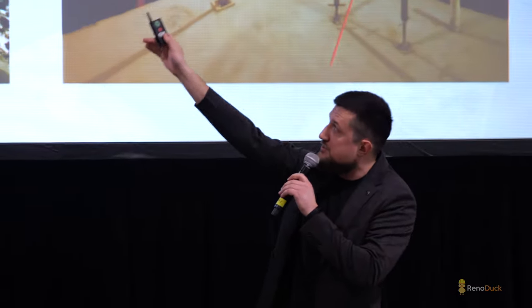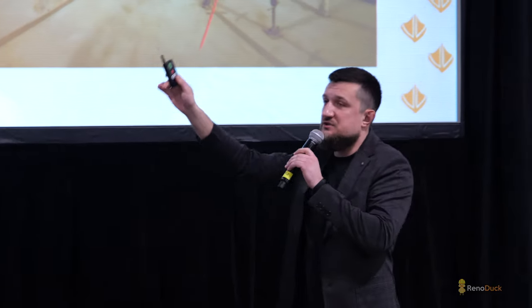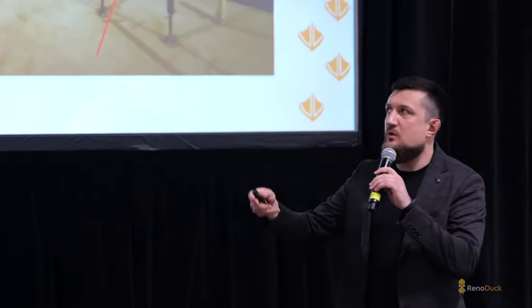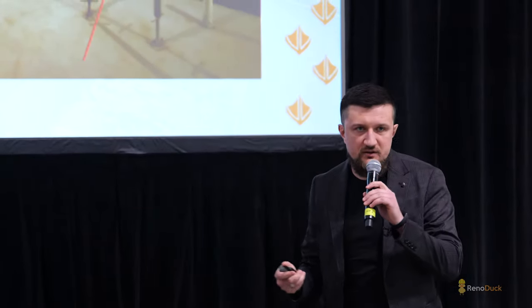sister the joists, and clean up a bunch of electrical. This is actually our project manager taking the videos. So there's sometimes old electrical wiring, old plumbing that we have to fix. There are sometimes structural things that we have to do. If you're doing underpinning, sometimes there's HVAC work that you have to do. If you have a radiator system, sometimes you have to move the radiator system, et cetera. So the older the house, the more preparation work you're going to need to do.